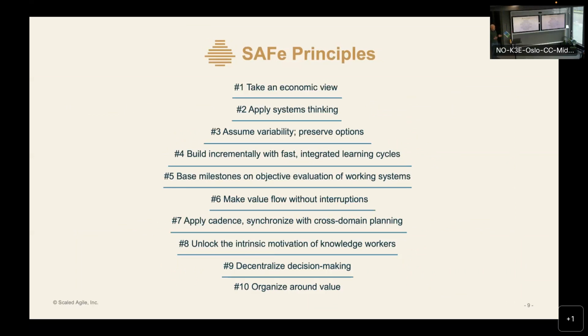So you should have the ability to maneuver along the way, because you might end up learning something and you need to pivot, right? So one example of that is if you early in the development process choose a technology or a concept very early on, you don't really have that variability with you along the way. You have chosen, and that's what we call a point-based design. You have chosen a design that you will have to live with.